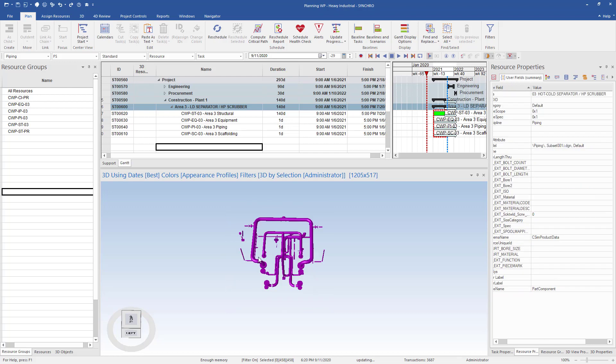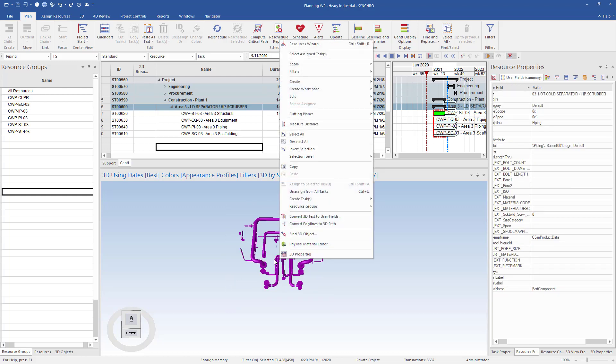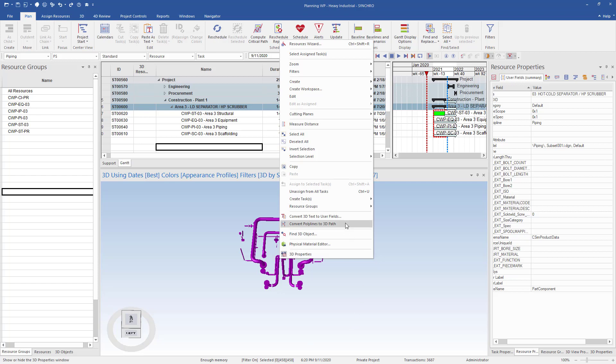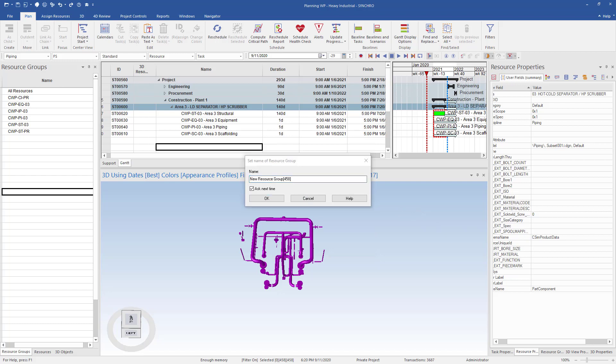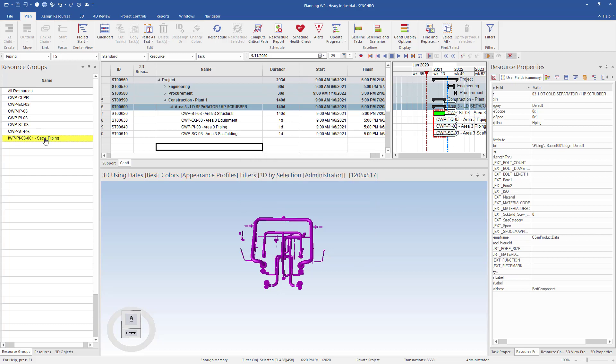Once we have just our piping, we will want to select all the piping in the 3D window by right clicking and selecting resource group from the list. Then choose create resource group from the selected. Resource groups are used to identify and bundle objects required for work packages. We can now give the resource groups the IWP name required and as you can see, a new resource group has been created for our piping.